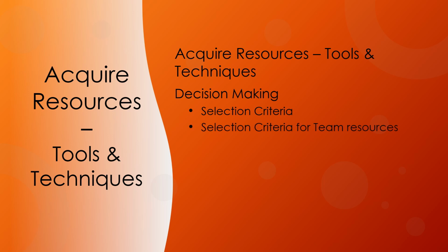Some selection criteria that are unique for team resources are: Experience. Verify that the team member has the relevant experience that will contribute to the project success. Knowledge. Consider if the team member has relevant knowledge of the customer, similar implemented projects, and nuances of the project environment.